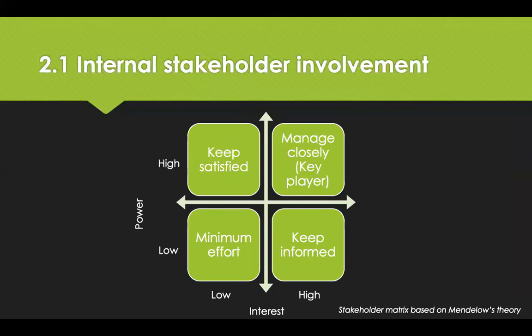But missing from this analysis is whether they are for or against the project. But nonetheless, if a stakeholder has a lot of power and interest, these are your key players. You must manage them closely. Whereas if they're high power and low interest, you need to keep them satisfied. High interest, low power, keep them informed, but only minimal effort is required if they have low power or low interest.